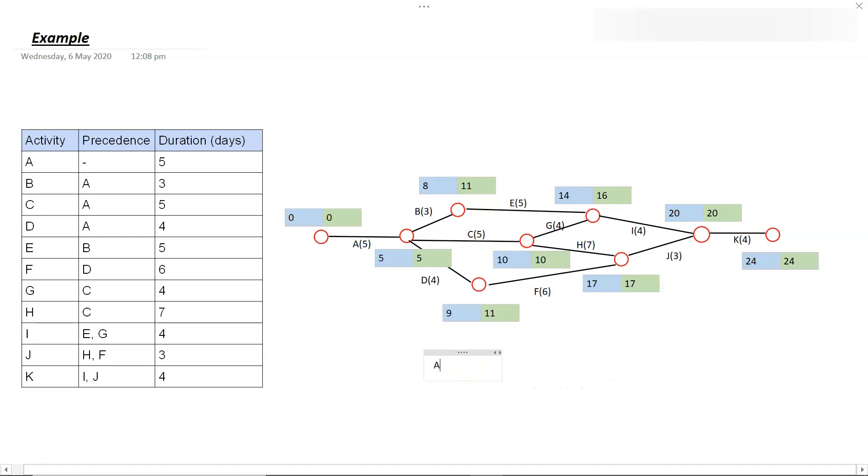So our critical path will be A to C to H to J to K, 24 days. Awesome.